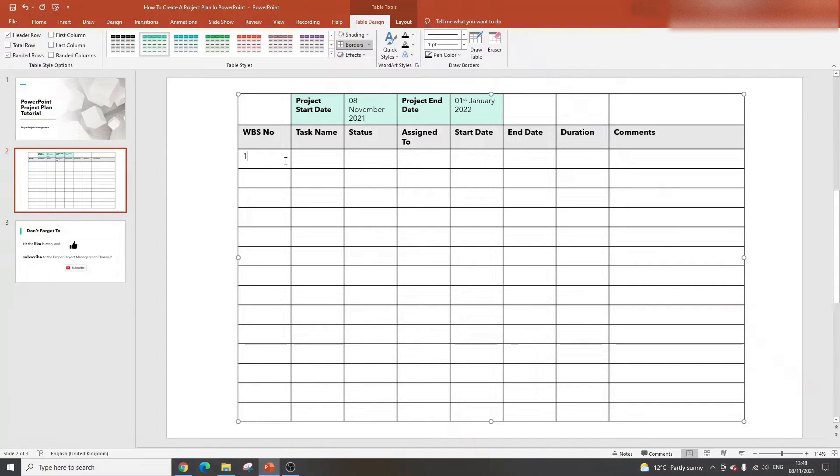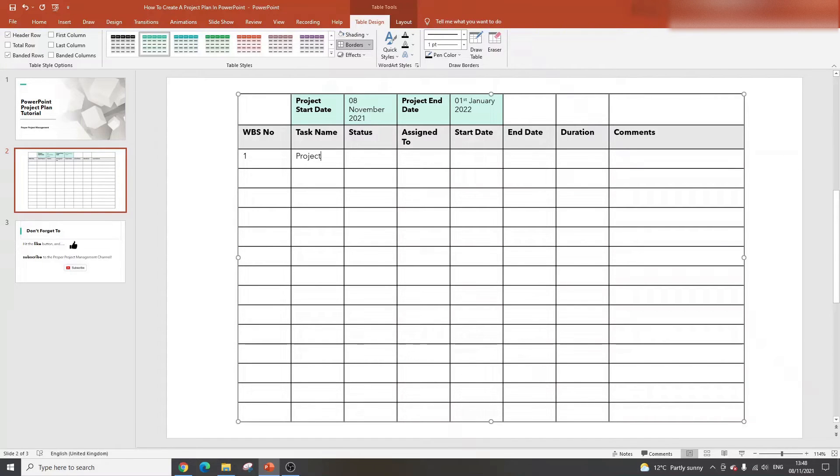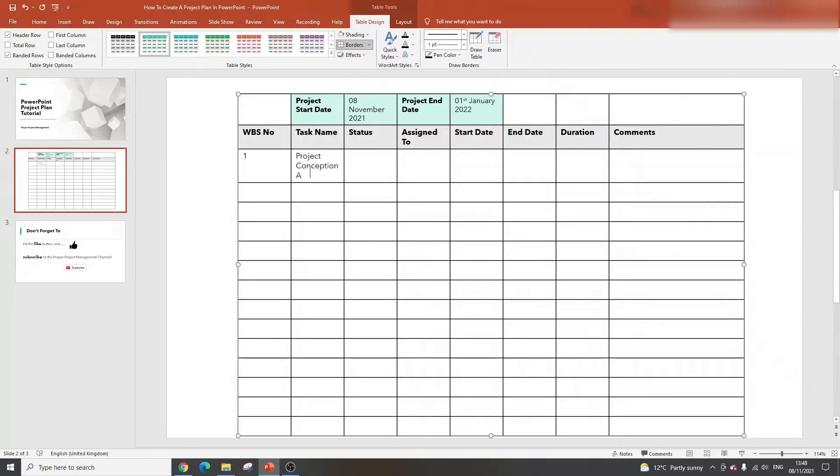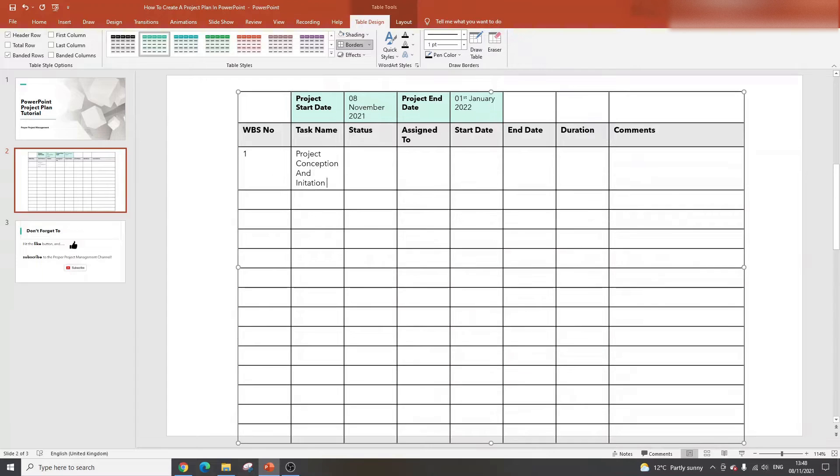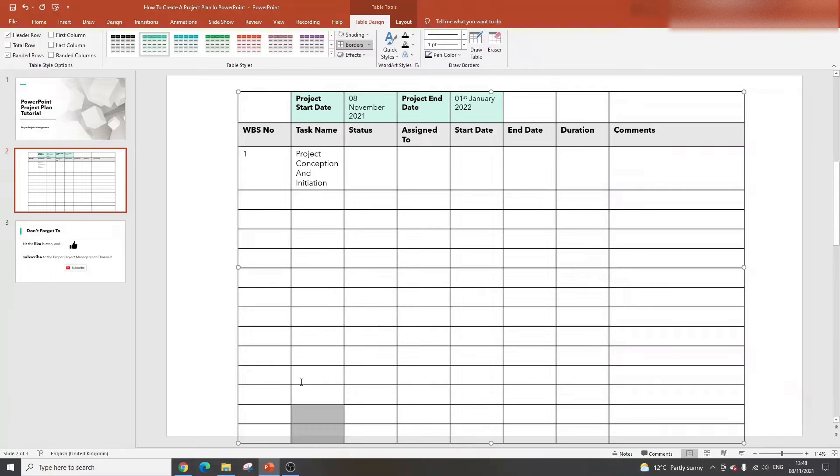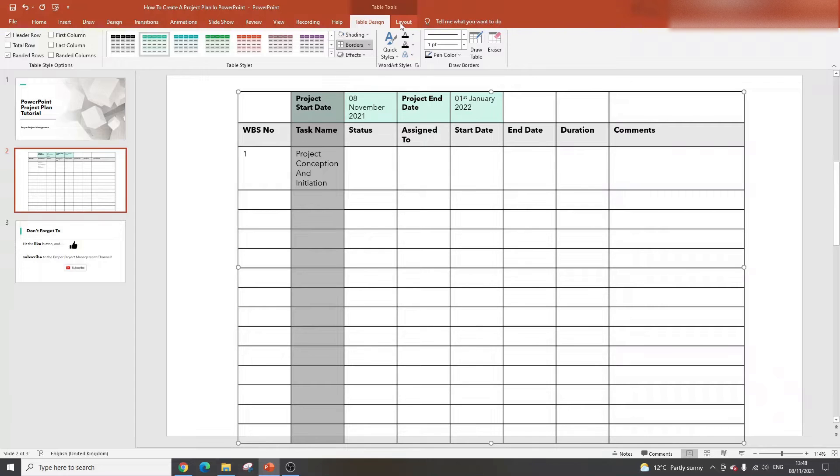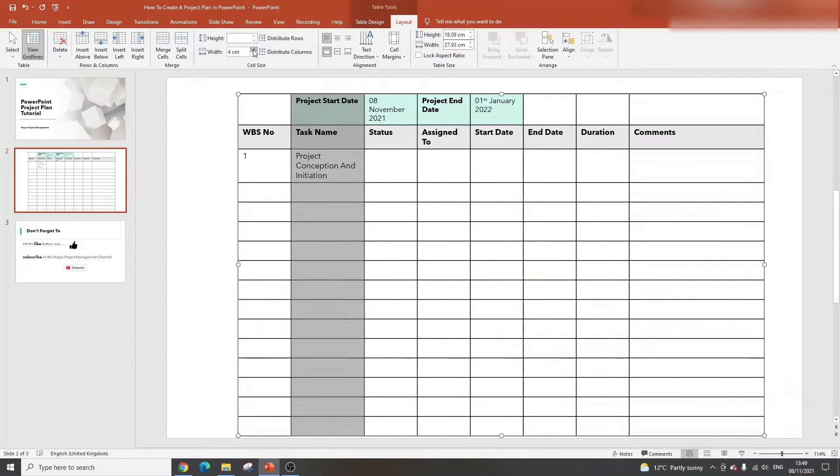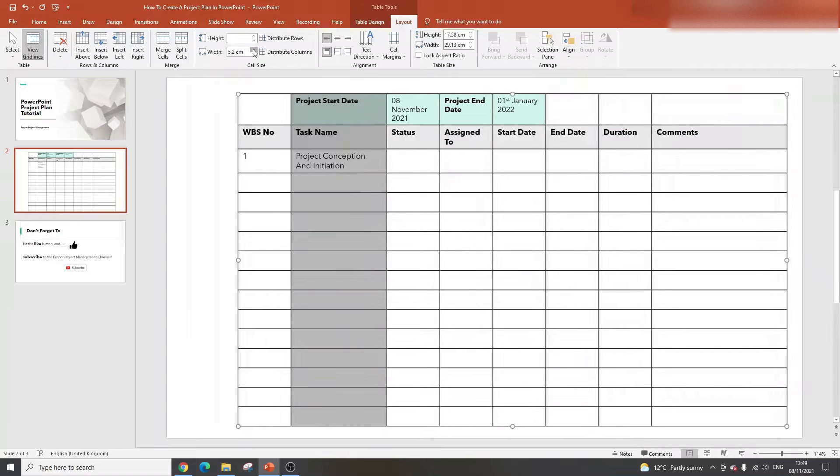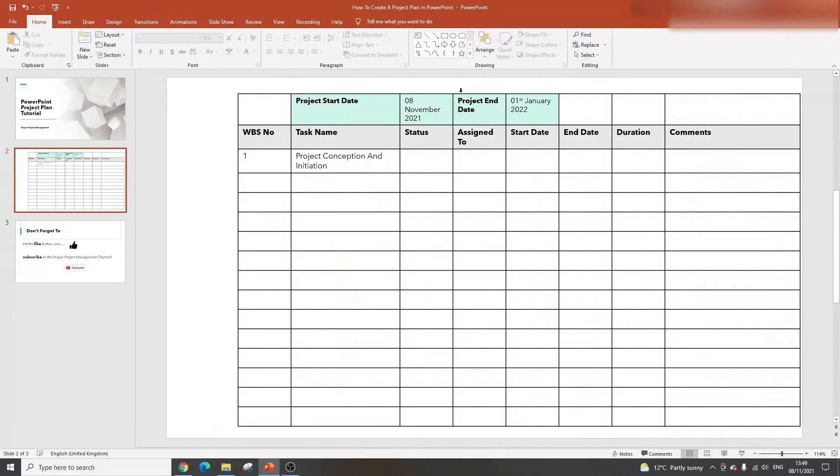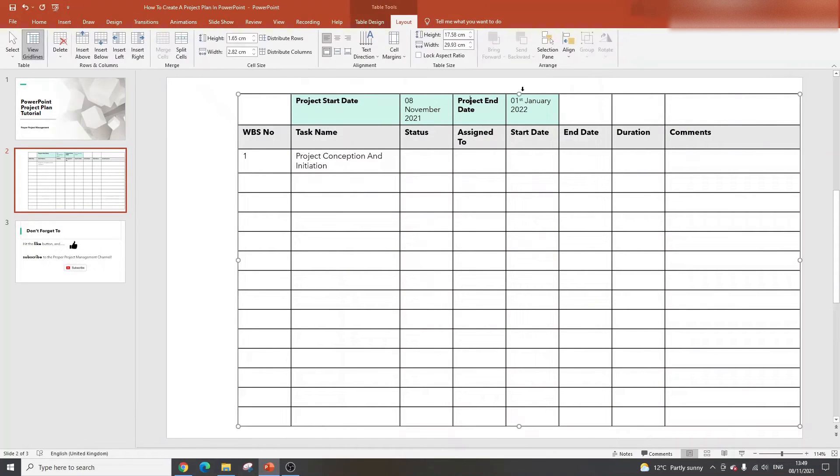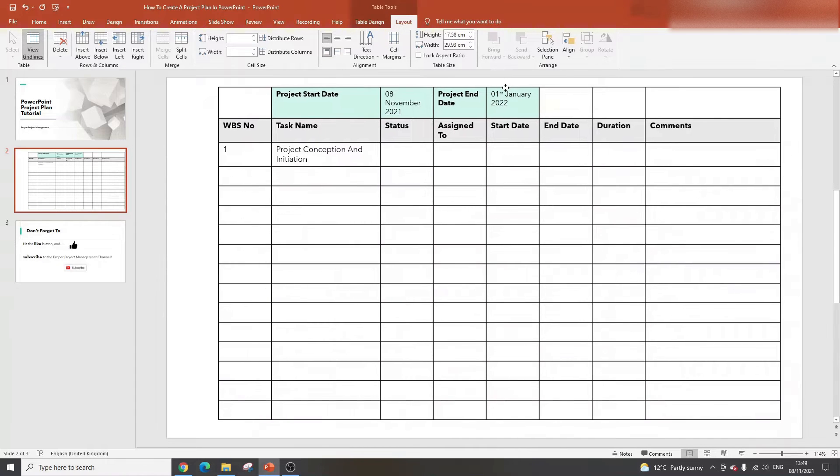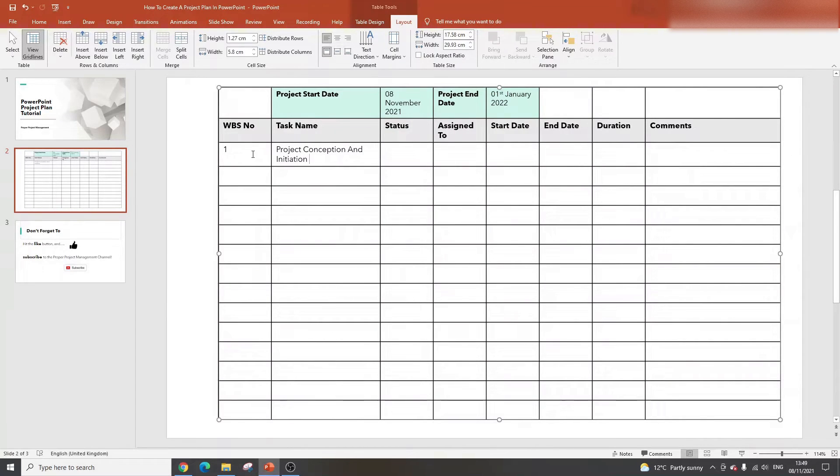Here we're going to have the different work breakdown structure numbers, starting with number one. Then we're going to have task name, status for each task, assigned to (whether that's an individual or a team), a start date for each individual task, naturally an end date for the task, a duration so we can see the length of each task, and then a comments column. Let's make this comments column wider by expanding the width. I'm going to put some shading in, a light grey for the column headers.